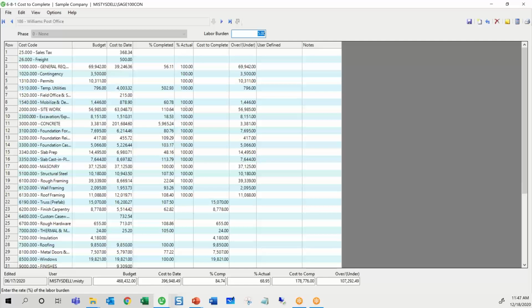And then you actually have a column called actual. And this is really powerful to figure out scenarios. So if you said, I am absolutely sure I'm done with this job, I have no more work to do on it, I hit calculate. It actually tells me if I'm going to be over or under my budget, which is pretty darn cool. So I had a lot more costs than my budget, right? So I'm $434,000 over my budget. Boy, I better be thinking about my job, don't you think? Like I might not have a job after this one.